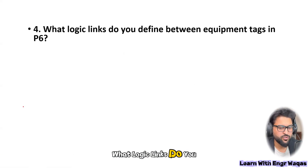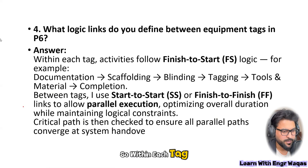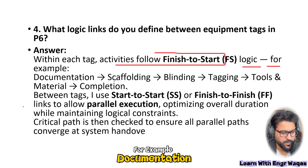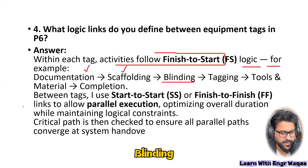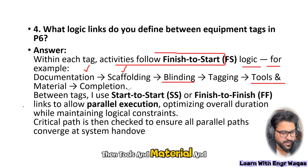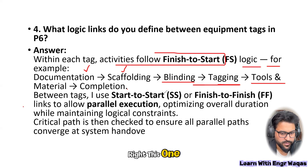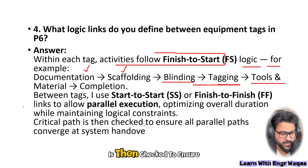What logic links do you define between equipment tags in Primavera P6? Within each tag, activities follow a finish-to-start relationship — for example, once documentation is done, scaffolding starts; once scaffolding is done, blinding begins; then tagging, then tools and material. Between tags I use start-to-start or finish-to-finish links to allow parallel execution, optimizing overall duration while maintaining logical constraints. Critical path is then checked to ensure all parallel paths are accounted for.